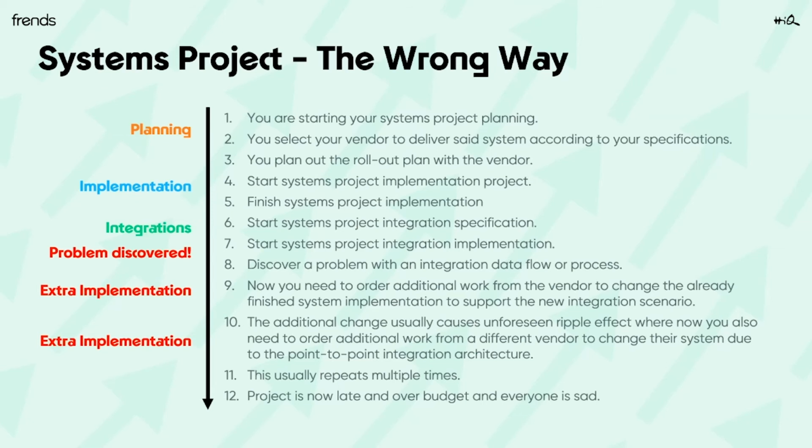And what this usually results in is that when you look at system implementation projects from a statistical point of view, almost always those projects go really well until basically the integration part starts. So up until step 5, we are always on budget and on schedule and everything is nice and dandy, but then the problems start when the integration is introduced, and the end result is almost always that the project is late and over budget.